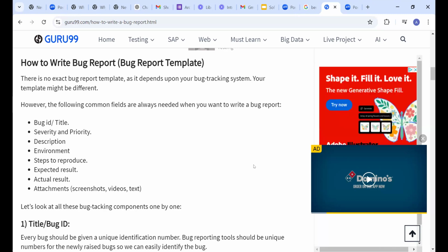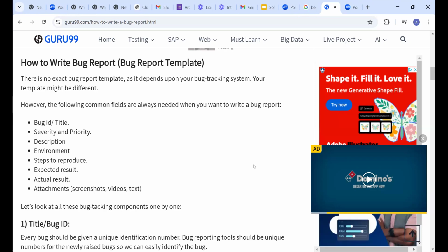Imagine if one of the defects is that you're not able to carry out a transaction, and you feel that you've closed out all the defects and it's just that you're not able to carry out a transaction. Meanwhile, that's even the purpose of creating that application in the first place. So your application can still not go live because you need to close that. You must be able to carry out transactions before you push it to the deployment phase, to production.